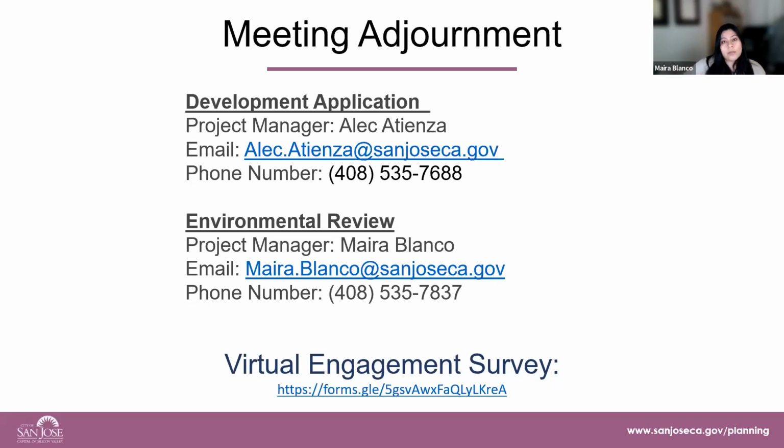Again, these are all things that will inform the technical studies that will ultimately be available once the EIR is published. There was a comment on when that might be available. Right now, we're in the notice of preparation phase. So again, we're just gathering comments. No technical studies have been prepared at this point. So those will be available, I don't know, 3 to 5 months. There will be updates on the CEQA page.